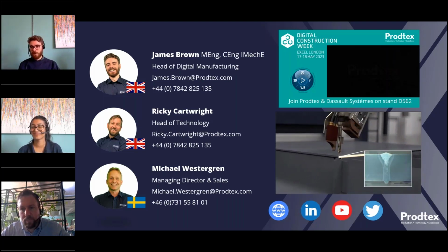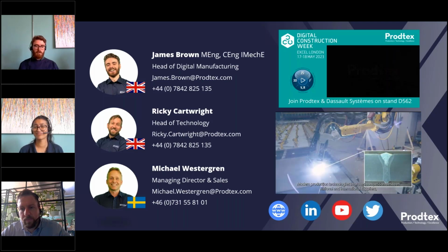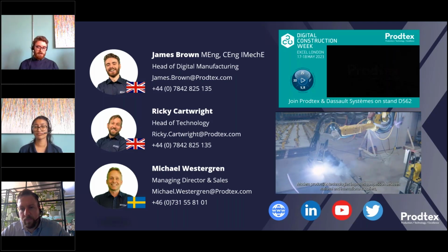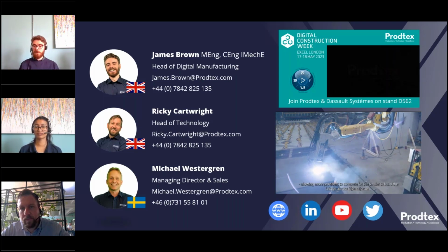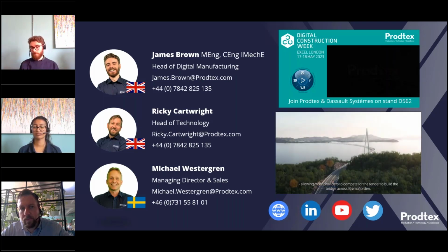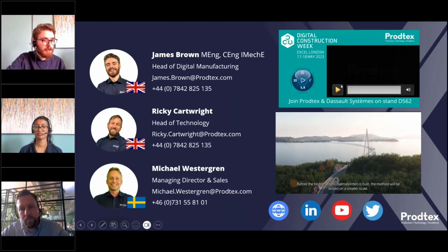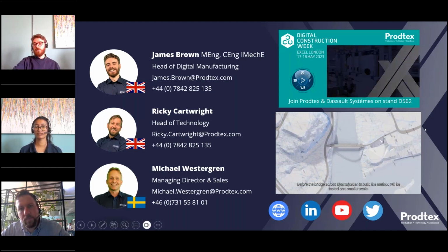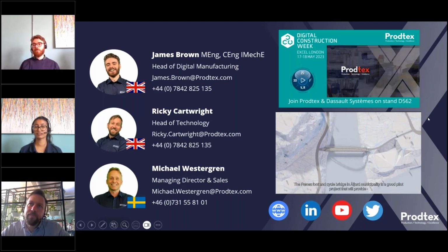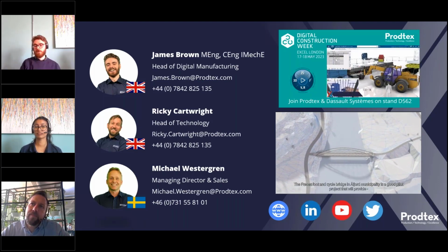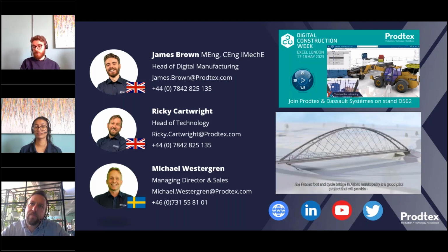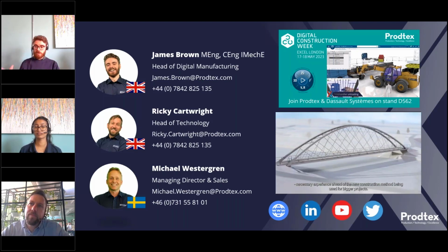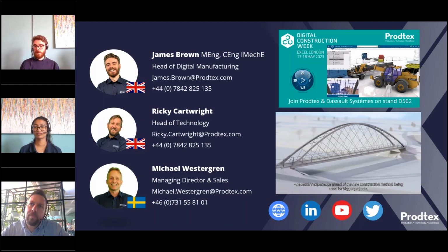Yeah, definitely. So if you're really lucky, from what we've seen in the past, if we're simulating this for a prefab product that's already been tested and already had maybe an initial build, or it might have already been used on a previous site, and they're just trying to figure out if this will work for new sites in the future, we have historic data there. We have measured data, so we can use that measured time data in our simulations to check it for the next site and the next site and the next site.